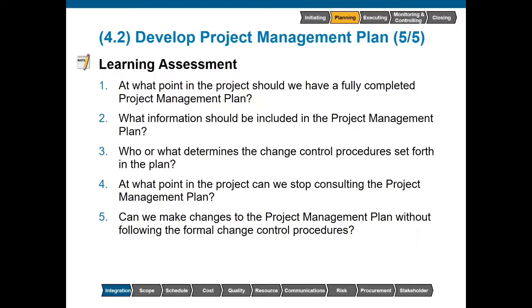At what point in the project can we stop consulting the project management plan? We don't stop consulting the project management plan until closing is completed because it also addresses how we close a project. Can we make changes to the project management plan without following the formal change control procedures? The plan can be changed without any formal change control until it has been baselined. Once it has been approved, it cannot be changed without following the change control procedures.